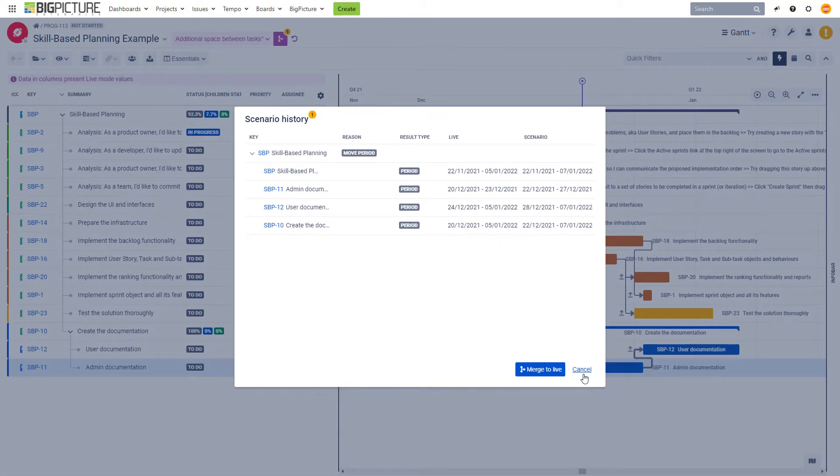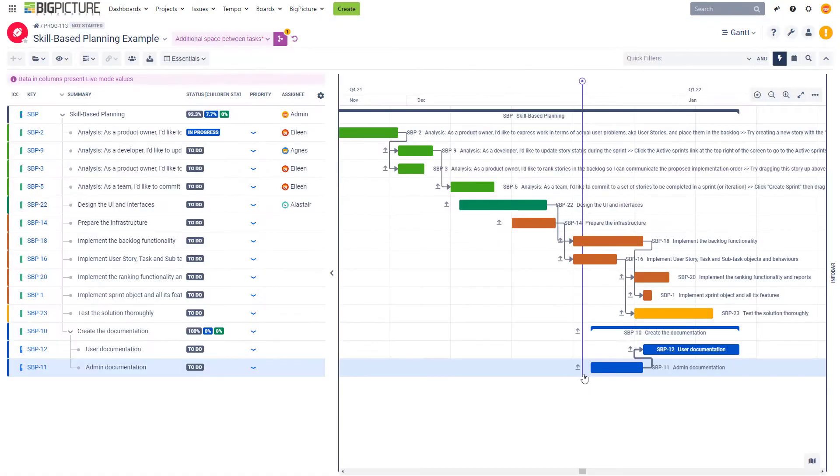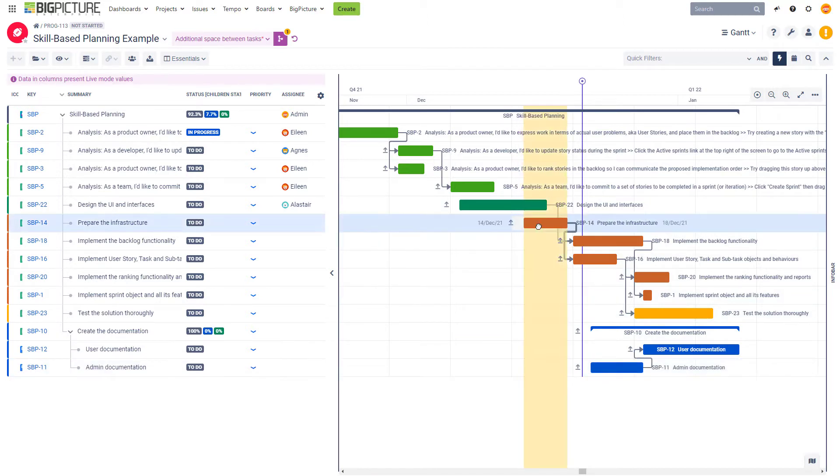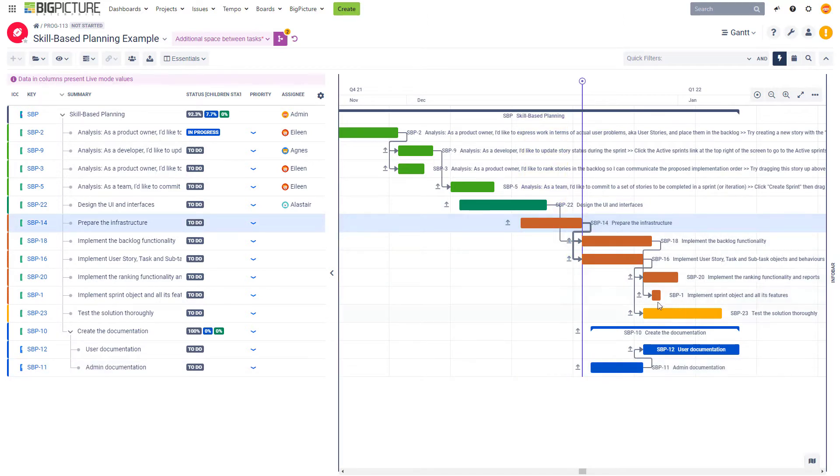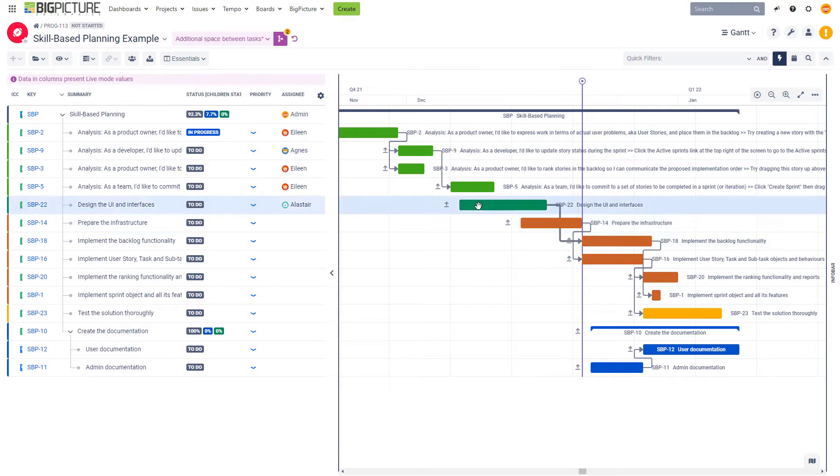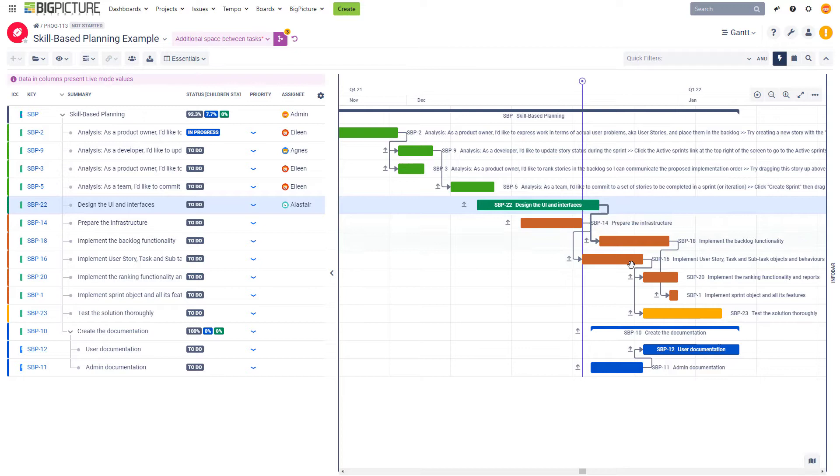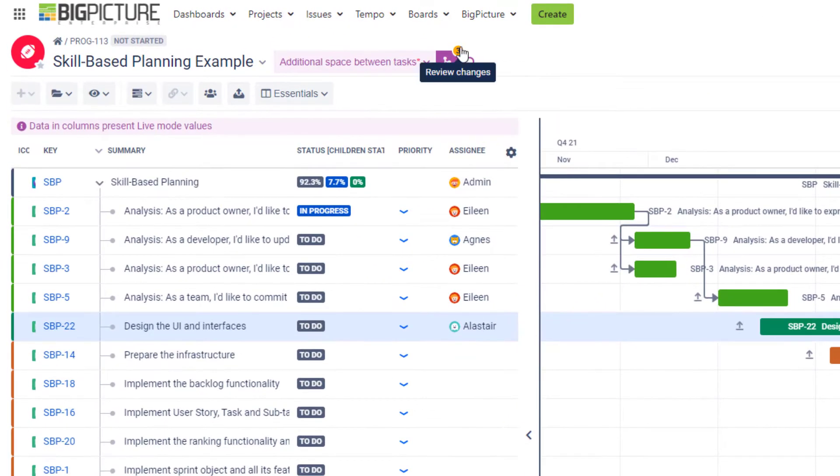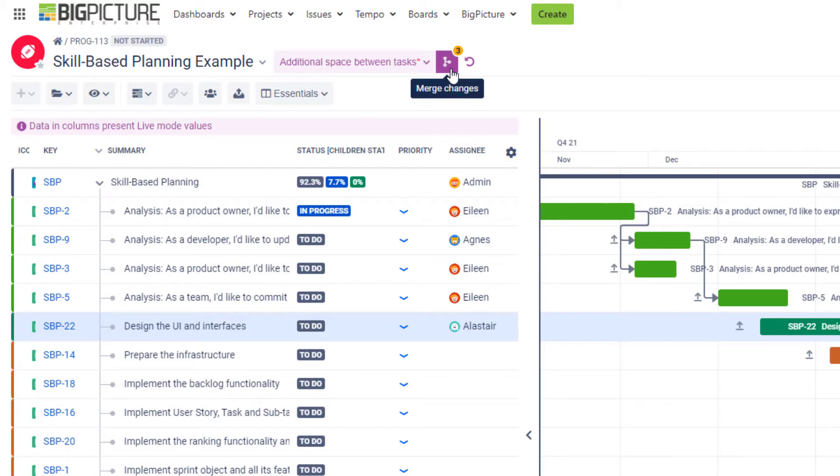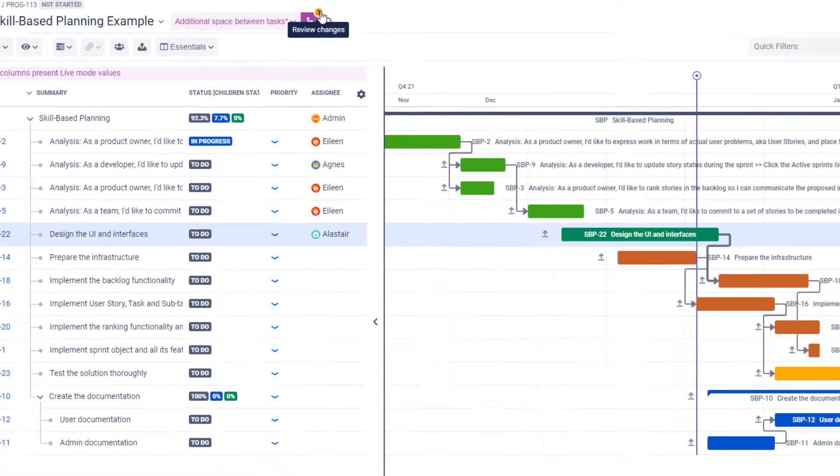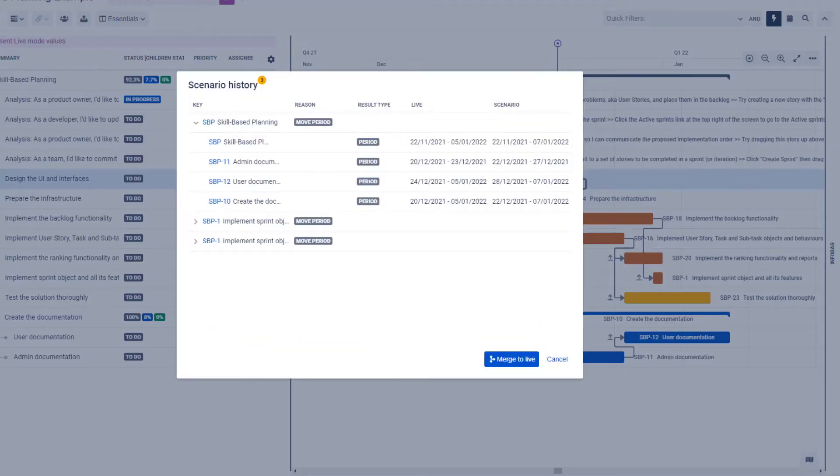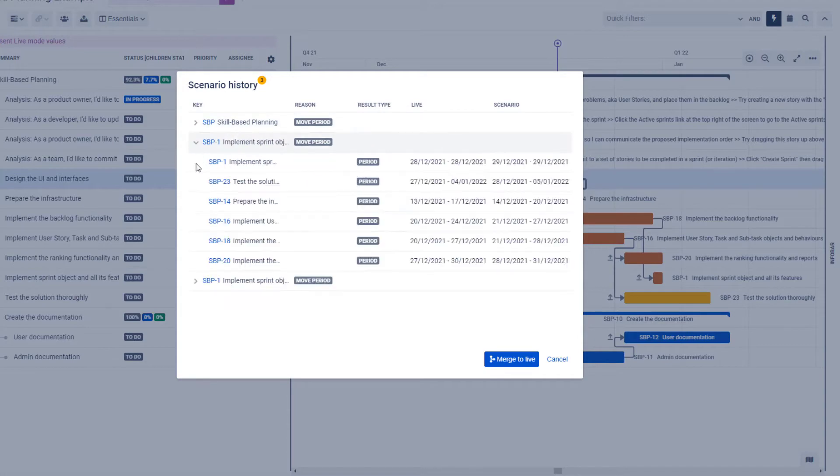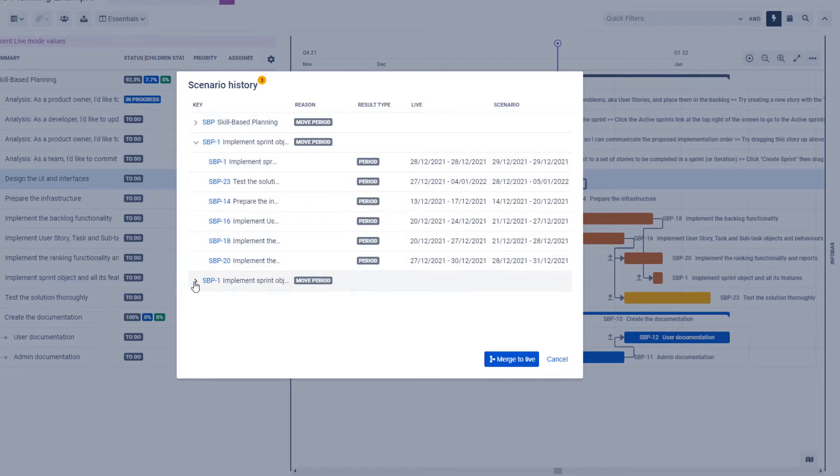If we make more changes—for example, I'll move this element a little bit forward, which would again push several other elements as well—another change happening. You can see that this number over here is growing; it's not showing one anymore, it's showing two or now three. Of course, if I again click over here, I'll be able to see the results of other changes that have been applied. Basically, any time you move an element on the timeline, there's a change being recorded over here for you to review later on.